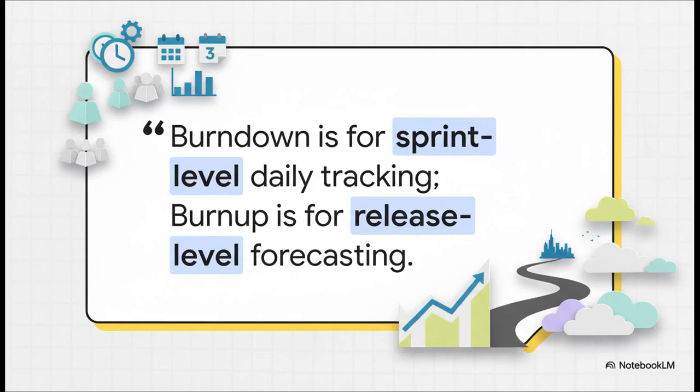And if there's one thing you remember from all this, let it be this. Burndown is for the team's daily internal tracking within a sprint. But the moment you need to talk about the big picture, about release plans and changing priorities with stakeholders, the Burnup chart is your absolute best friend. It tells the whole, honest story.